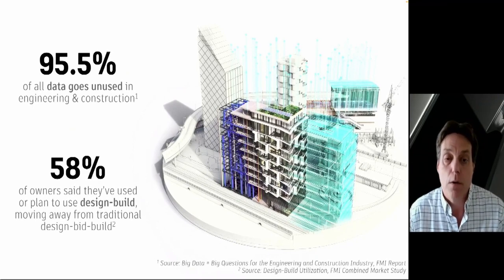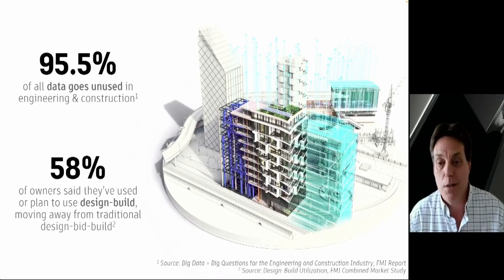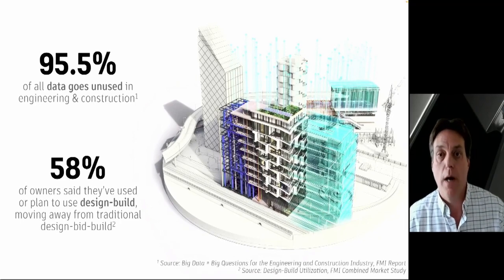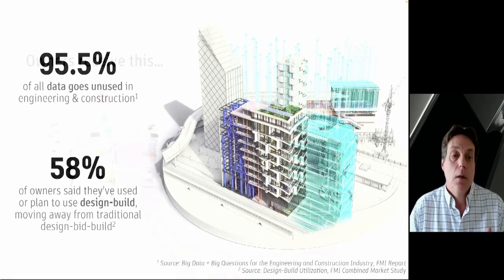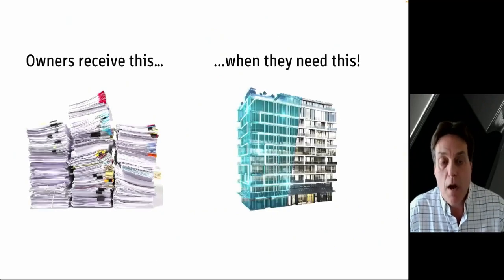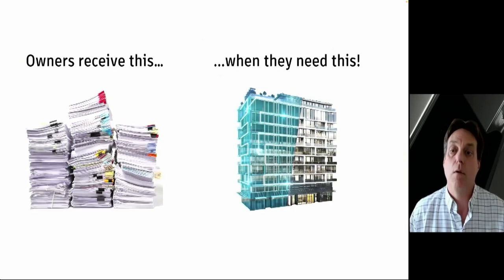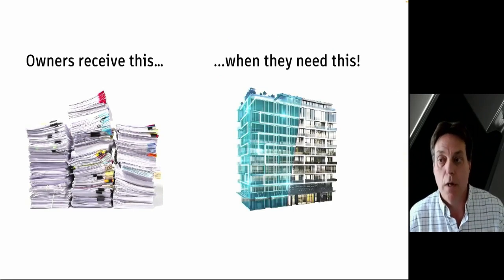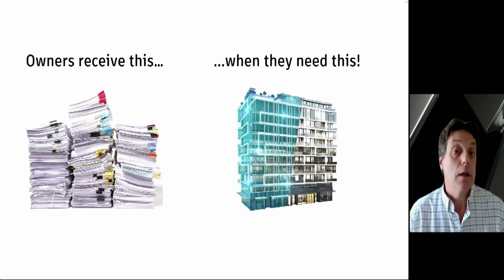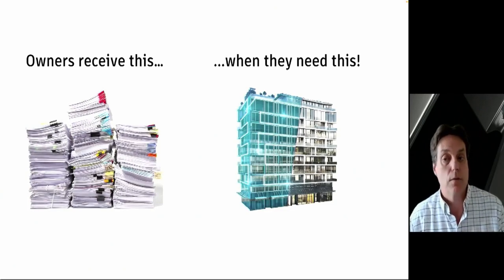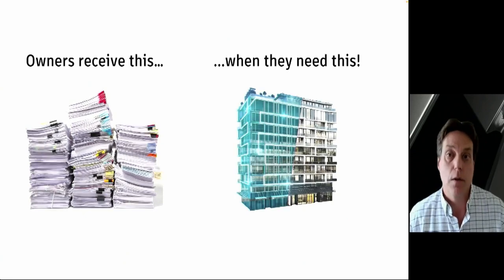We have heard from owners that it can often take 9 to 12 months to go from project turnover to an operationally ready facility. Why is that? Because a repeatable BIM to FM process has never really materialized in the industry. At handover, owners and operators receive mountains of handover documentation that leaves them an insurmountable challenge in terms of creating an integrated solution for monitoring, managing, and tuning their asset.